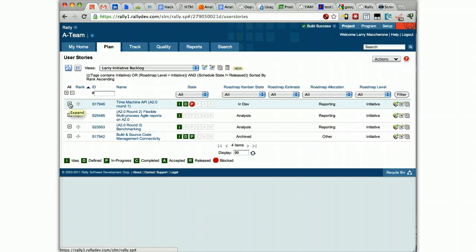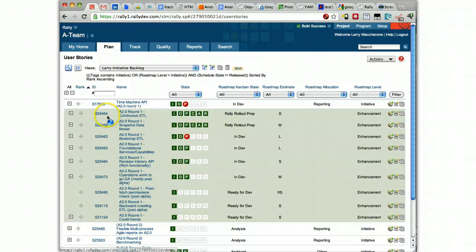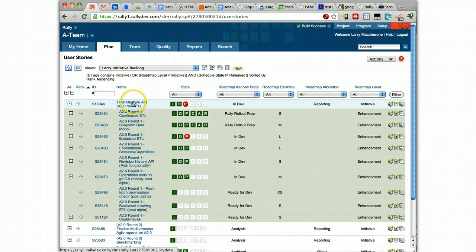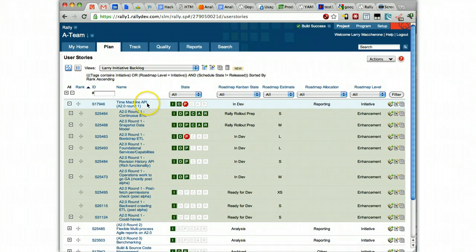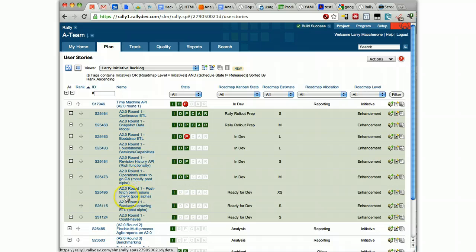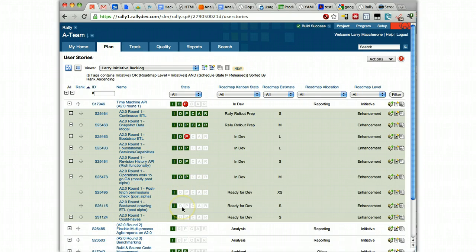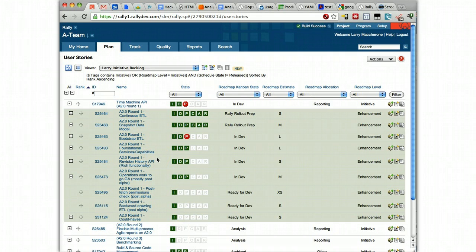Hierarchy in Rally for stories or for work items, or you might even think of it as a work breakdown structure. So the initiative that we're working on right now is called the Time Machine API, and it's got nine different enhancements, we call them. We also have tech enablers as well. Tech enablers and enhancements are at the same level. They're at a level below initiatives.